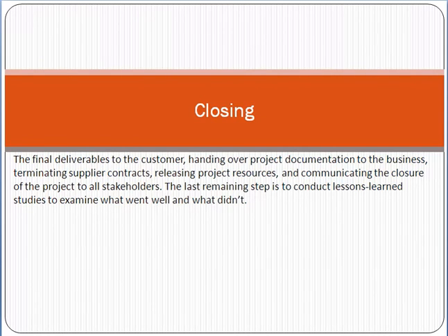And then the next and last phase is the closing phase. Closing phase means that we close things, which means we deliver the items to the customer, we get the sign-off from the customer, we release the resources, and we make a lessons learned document in which we document which things went well and which things went wrong, so that it can be helpful for others as well. So formally we close the project in that phase. So this is the last phase of a project life cycle.